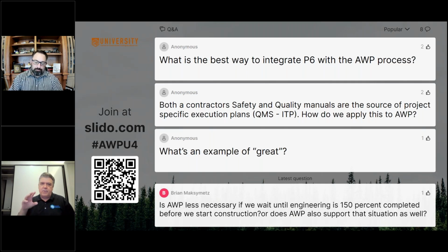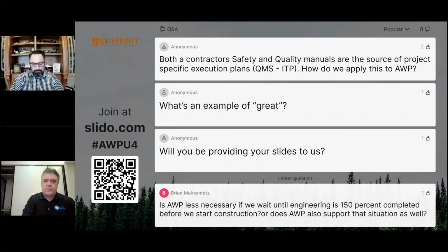The CWPs aren't intended to be a one-to-one. Sometimes they are a one-to-one with the P6 activity. Sometimes one CWP multiplexes into multiple P6 activities. Sometimes one P6 activity breaks down into multiple CWPs. So you get a CWP integration without having to have a company change the way they're doing schedules, and AI can analyze the schedule and marry up. That's the path of construction automation. Marry up the CWPs, or ahead of time, take my CWPs and automate a schedule from those CWPs that isn't exactly by CWP. It's the magic that WorkPax does.